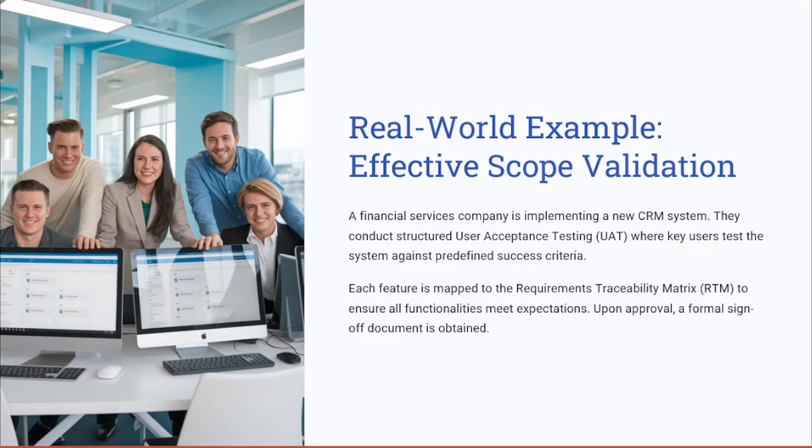Now it's to ensure that each of these requirements is well accepted. So each of these user groups has to conduct user acceptance testing as part of quality control to ensure all of the functionalities meet the expectation. And upon the approval of these users, a formal sign-off document is obtained from these users, stakeholders, or groups to ensure that there are no disputes later.